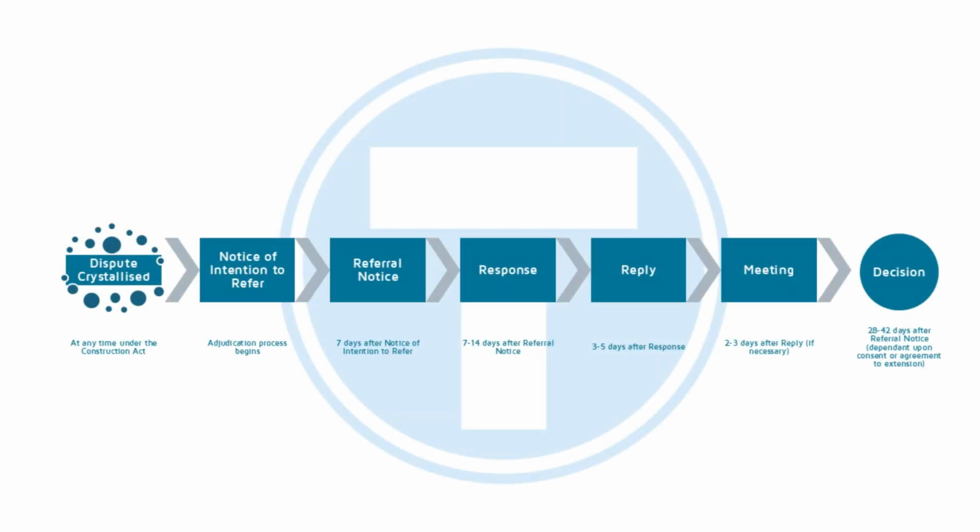The adjudicator will invite written submissions and evidence from each party. Typically, a referral of dispute document is submitted by the claimant, which outlines the dispute and includes supporting evidence and legal arguments. A response document is submitted by the respondent, which outlines their position and includes supporting evidence and legal arguments. If the adjudicator deems it appropriate, the adjudicator can direct that hearings are conducted where further evidence, witness statements, cross-examination, or adjudicator's questions can be outlined.